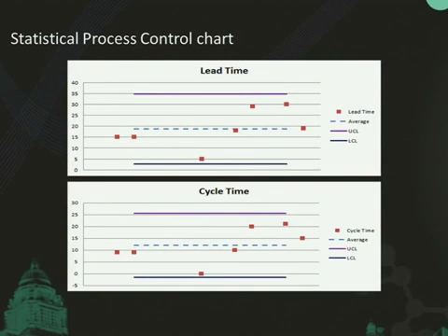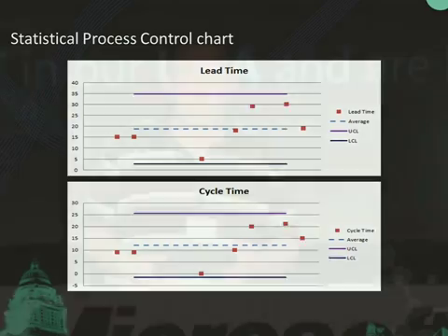So what we can do is filter this information and look at particular types of work. You might create a new work item type called high priority sales work item or high priority project. You can then filter the data and say, for high priority projects, or for example, for 13-point user stories, how predictable are we? So you can filter that data.